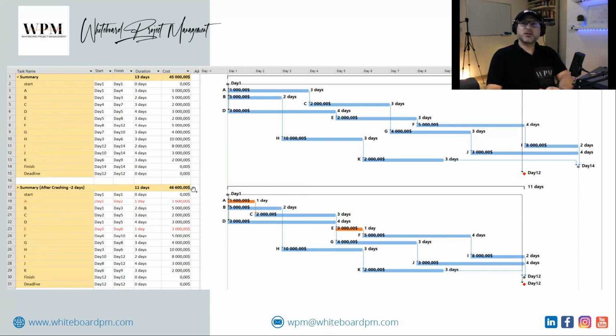And this cost should be taken either from your activity contingency reserve, if the risk is defined, or from the management contingency reserves if the risk is not defined, or the client pays it for you as a change order if the client requests to reduce the duration from 14 days to 12 days.